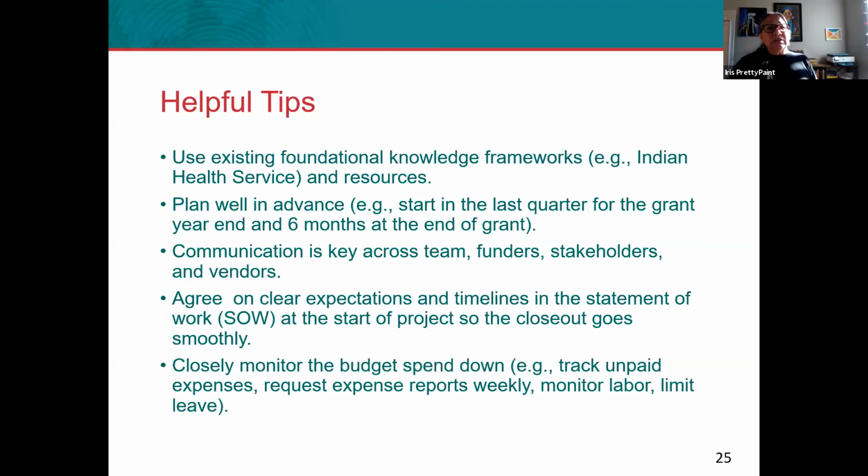When you get ready for closeout, it requires a different kind of monitoring of your budget, so that you have to know basically every month, and then as you get down closer, every week, what you look like. And sometimes it's every day. That's how closely you can get down to the spend down of your project. One tip is to limit the amount of leave that your team can take in closeout, because every time they take vacation or they're not there at work, that means that you have that labor to manage in your closeout. So that's just a tip that I wanted to share with you.